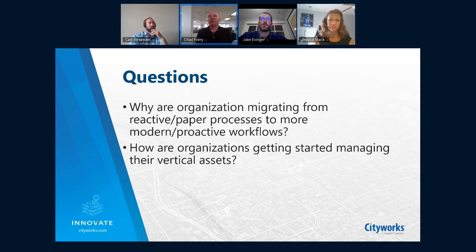Yeah, I think that's a key piece too. The data collection crews should be small and consistent. We went ahead and created the work order templates for each kind of group, and then we'd go to the next group, and it was kind of an iterative process.